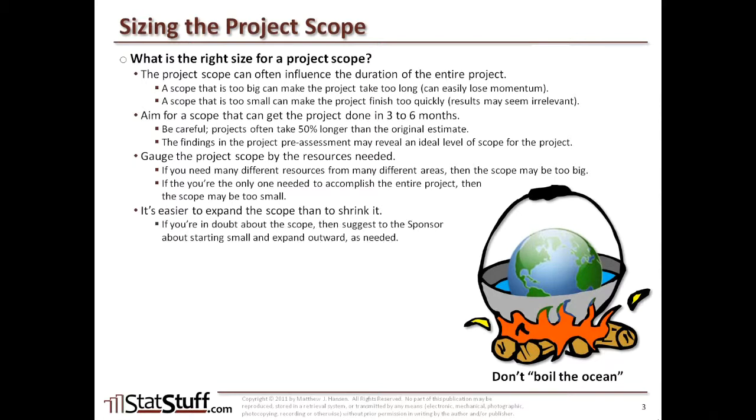So if you're in doubt as far as how big to make the scope, I would recommend that you work with your sponsor about making the scope a little bit smaller than what you might expect, because then as you approach it and dig in and research it, you might find that you can expand it from there. It's far easier to do that than to start off too big and try to drill it down, because you might get the impression as if you're not accomplishing exactly what the customer, or in this case the sponsor, is really wanting you to accomplish.